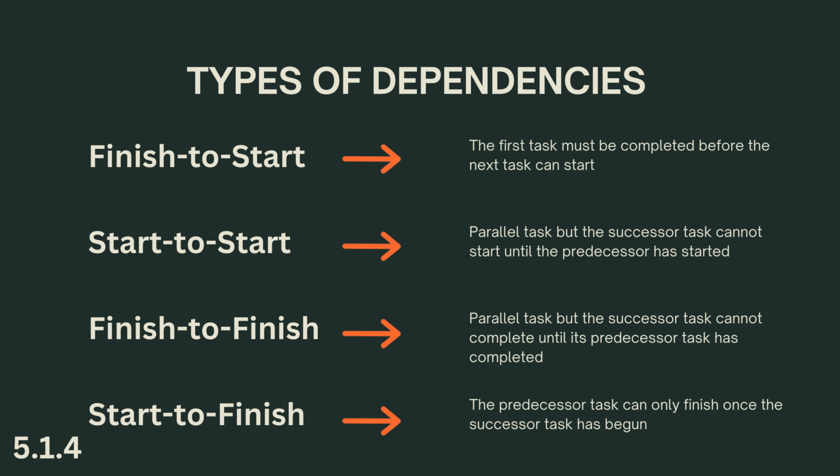Start to start, STS. In some projects, tasks need to be carried out in parallel. These projects often use the start-to-start methodology. For instance, in a project to implement a new digital system, you might have 2 parallel tasks: monitoring the new system's performance and carrying out stress testing. The stress testing can be carried out alongside the monitoring, but the monitoring must start before the testing can begin.